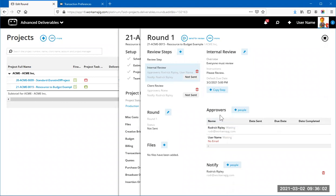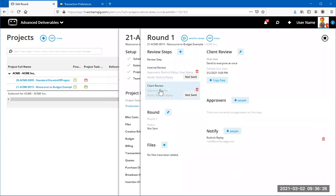The approvers get notifications at the beginning of the round when it's sent for review, because they're the ones commenting and making decisions. Once the internal step is approved, the file from that round automatically flips to the client review step, where the client becomes the approver. You would be on the notify list so you're alerted when the client makes a decision.